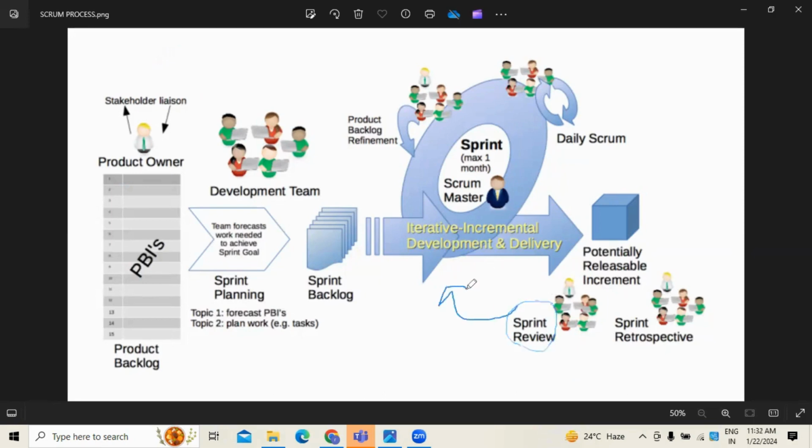In this review meeting, normally the Scrum Master has to prepare some reports, such as burn down charts, burn up charts, and velocity. Velocity is based on the previous work we have done so far. We have to see to what extent people can complete the remaining tasks within the specific timelines, so projection is important. We have to predict that. That's where these review meetings are conducted by the Scrum Master. This is also one of the responsibilities we have to make sure of.